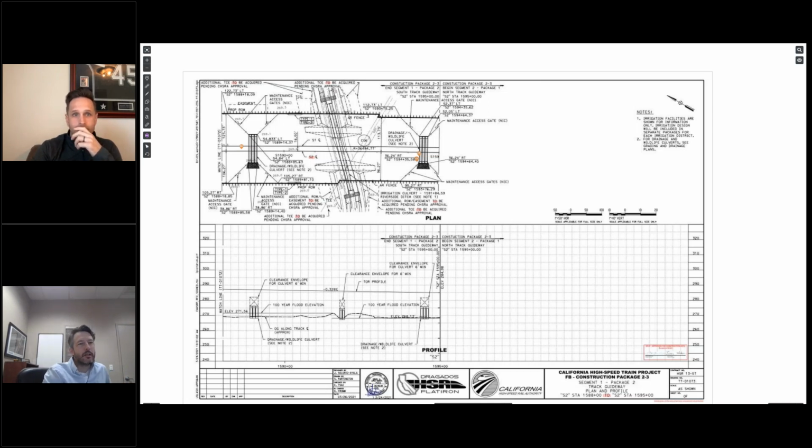So one of the problems we had early on in this project is because of how vast it is, we have a lot of inspectors out in the field, looking at a lot of different work and producing their reports. We didn't have a real unified system of documenting the work in the beginning. Basically, we had our checklists that pertained to particular work, but if an inspector went out and work was incomplete, we would require at least 2 checklists to demonstrate that that work was completed. It was very hard for us to know if a single report covered all the work or if we needed multiple reports, and it was a lot of sifting through paperwork to try to figure out where we stood.